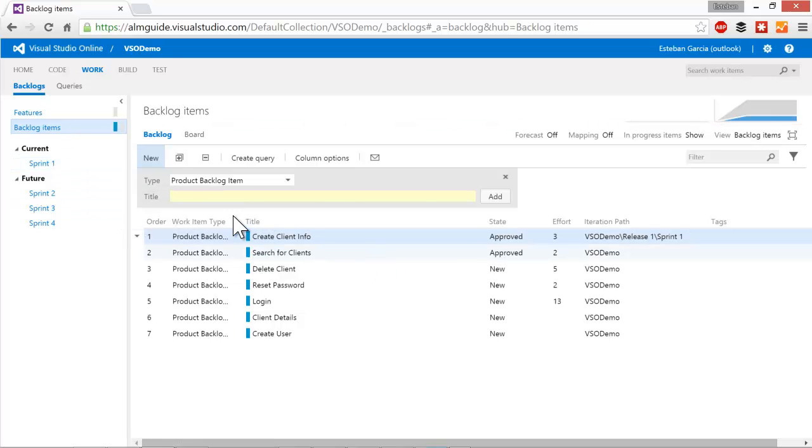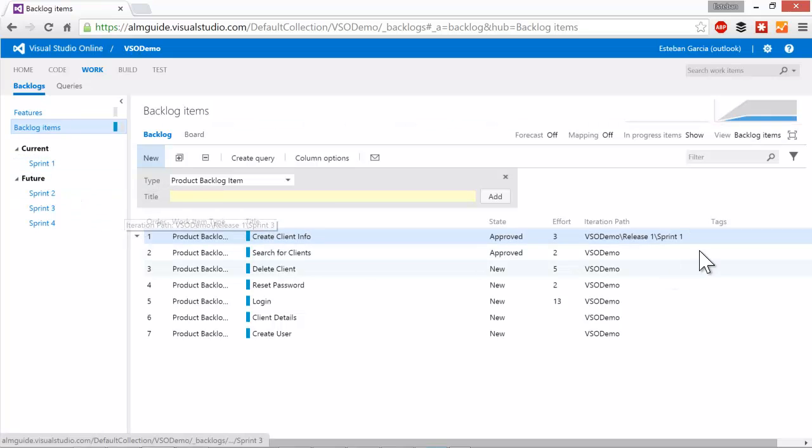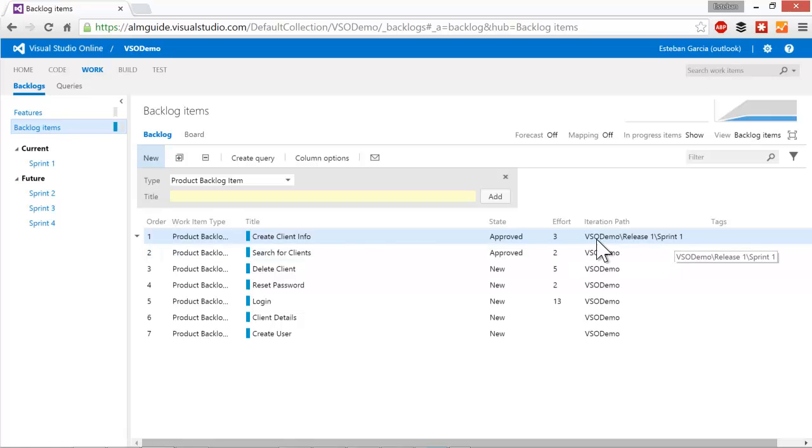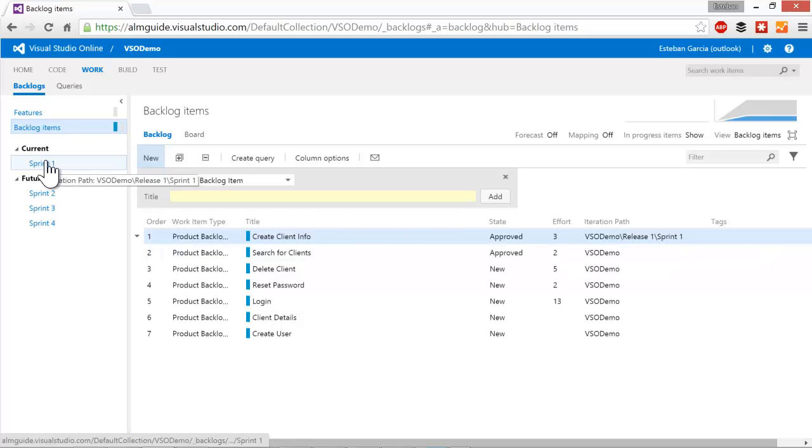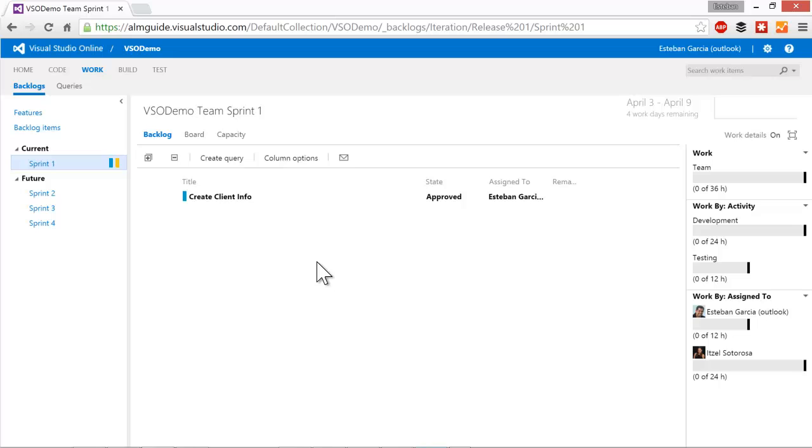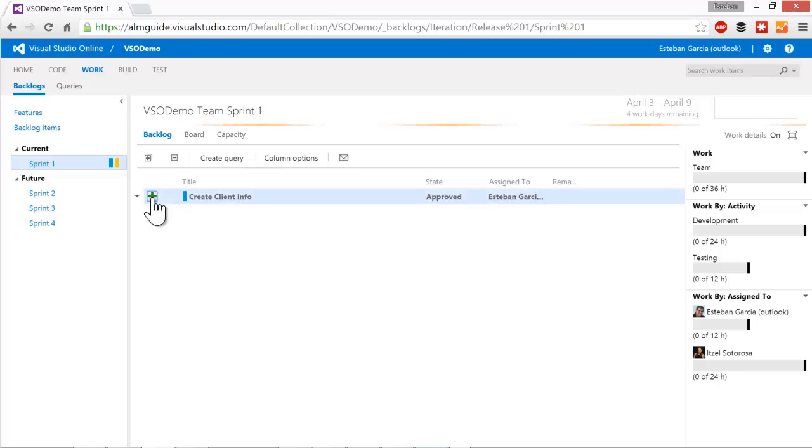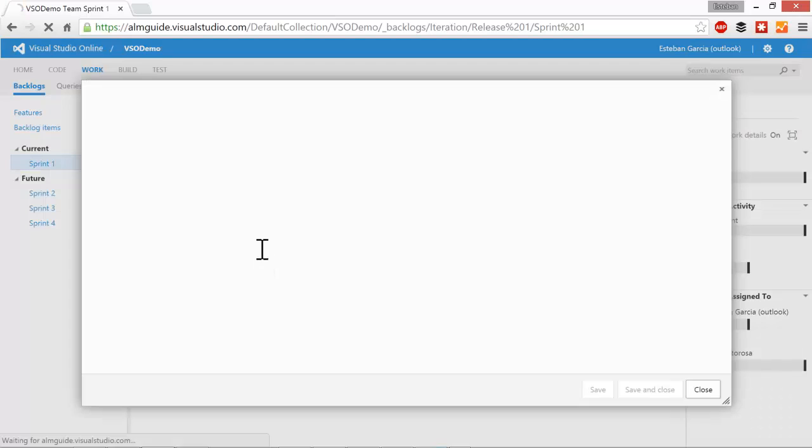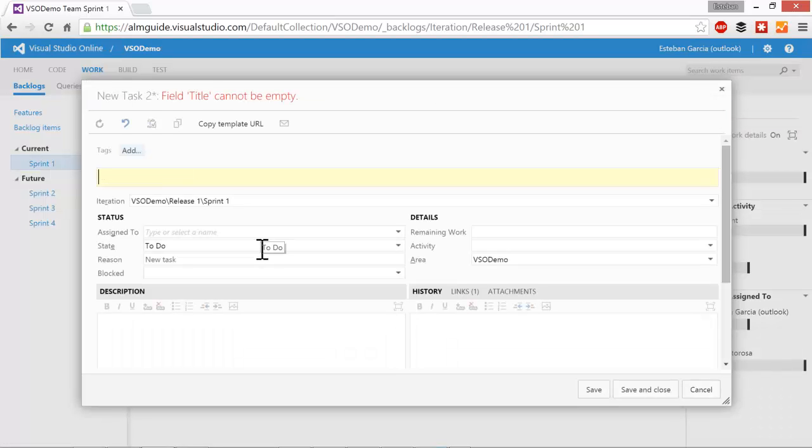And what I'm going to do is I'm going to drag the stories into sprint one. So start with the first one. And once I do that, you can see on the right hand side, the iteration path changed. So now I can go to sprint one and that story is going to show up on my backlog. Now, I need to break this story down into tasks so I can know whether I can work on this or not for this sprint. To do so, I can hover over the story and I can click on the plus icon that shows up on the left hand side. This allows me to add a task. It brings up the task dialog.